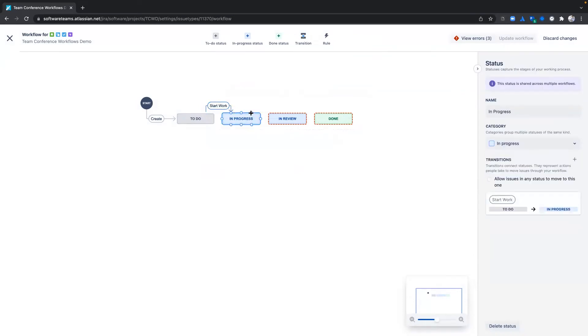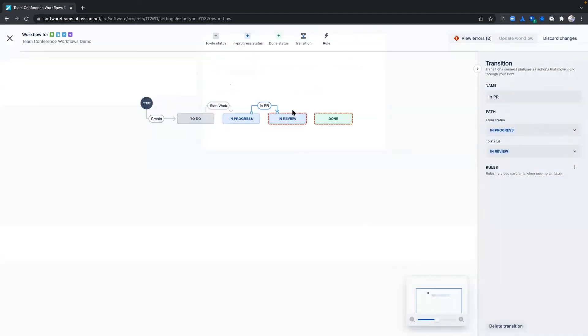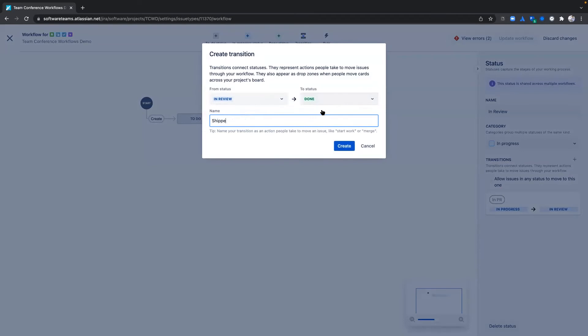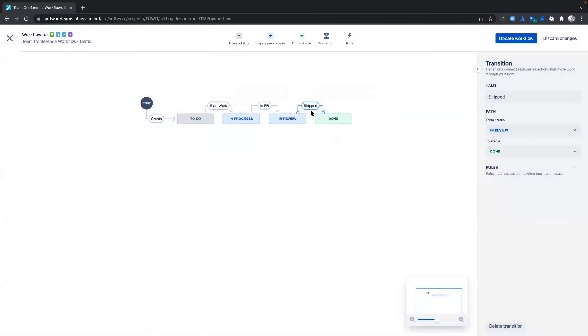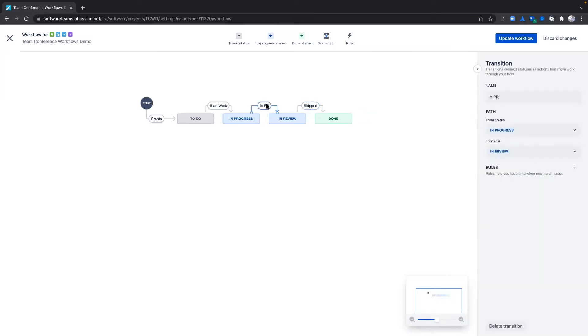When an issue transitions from In Progress to In Review, it's in peer review. And finally, when an issue goes from In Review to Done, it's shipped to production.